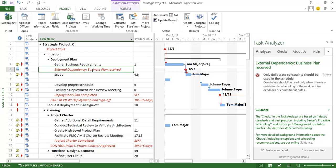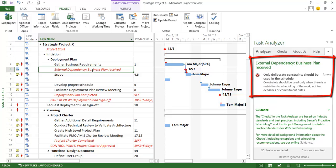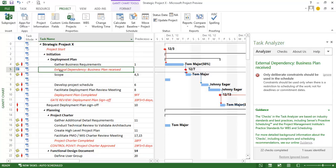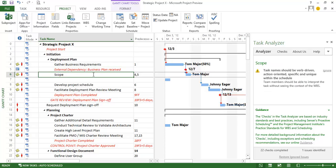As I keep going through this I get additional messages such as this one here that says that I should only be using deliberate constraints in my schedule. And in this particular case this is a valid constraint because it's an external dependency that we're receiving the business plan. So that one's fine. I can even go ahead and ignore this particular issue but I'll leave it alone for right now.